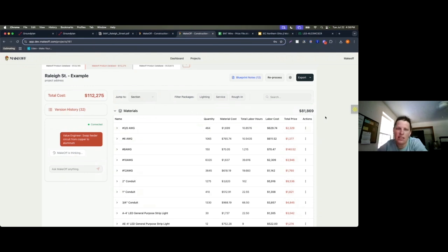And that's something from personal experience. One of the things is especially the height in the building. So you go, wow, the building's got 10-foot ceilings, that's not bad. But we're on the 20th floor. You know what I mean? And we're schlepping everything. And if you forget the screws, we're back down in the freight elevator and we're back up. That's something that I've found is a frequent miss point in estimating, just like part of the dirty dozen of things people, and even including me in this category, miss when estimating.